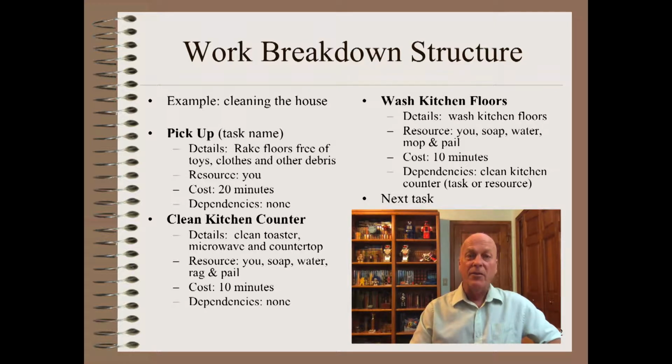The fundamentals of the work breakdown structure were codified by the U.S. Navy in the late 1950s. It has been refined and used by millions of project planners ever since. A project is first broken up into smaller tasks. Each task is described in detail. The required people and money resources are listed. Finally, any prerequisites are also listed. Prerequisites are critical to, excuse the pun, the critical path method.